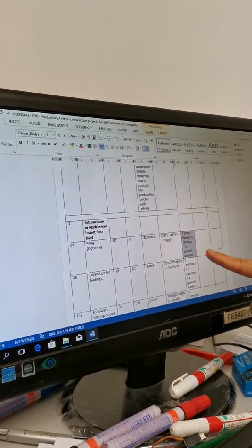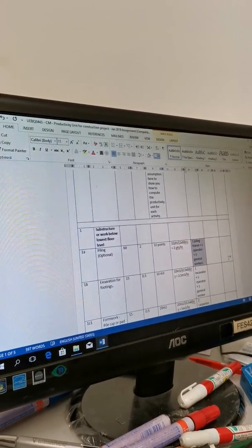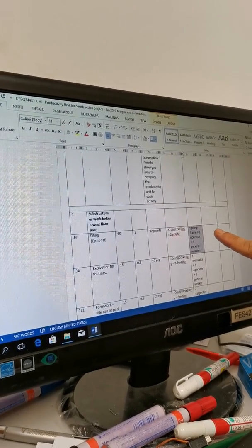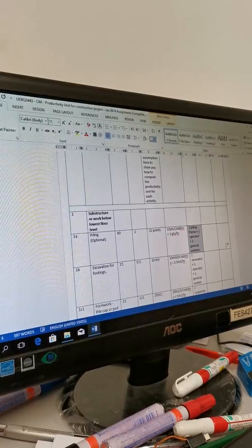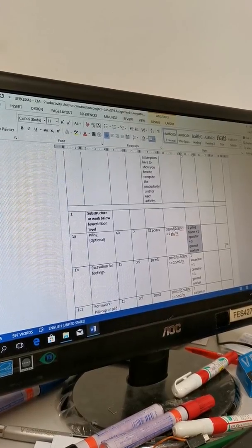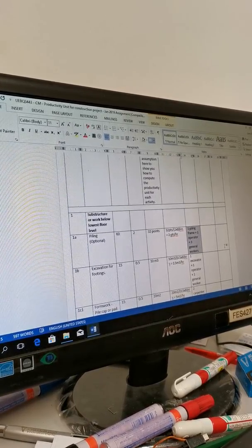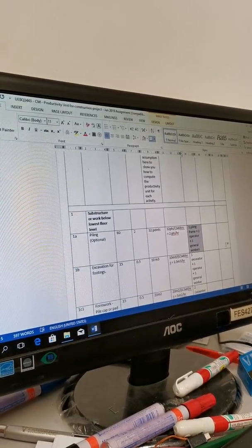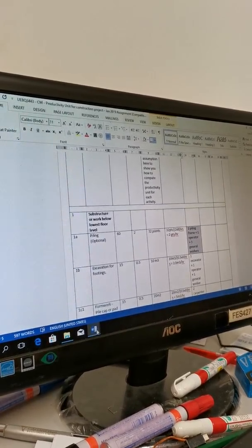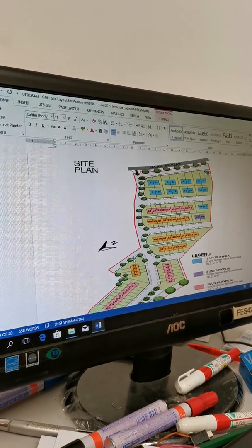But if you really want to do 100 units, you don't times 100 for the machinery. The people you must have, because this is only sizing for the per unit. The people, the resource there, carpenter you must have. If it's one carpenter here, 200 units, that will be 100 carpenters. But usually you calculate per block. You won't calculate all the units. So you always calculate per block.